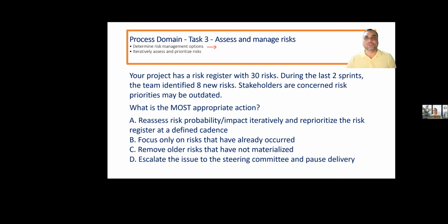The risk owner is a person who is responsible to identify the risk, provide the trigger conditions for the risk, and provide responses, contingencies, and fallback plans for the risk. The risk action owner is the person who will be implementing the responses. If nothing is working, they will report to the project manager and it will be handled as issue management. How frequently we will review the strategy is also determined in the risk management plan: weekly, daily, hourly, or quarterly, depending on the type, size, and complexity of the project.